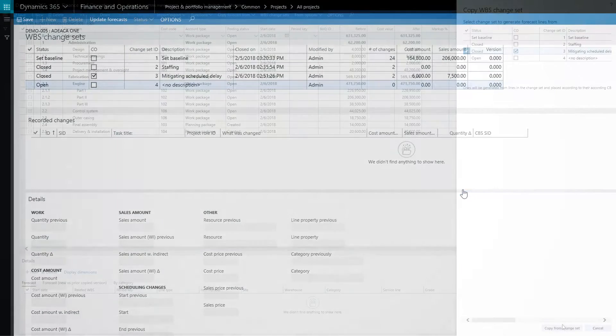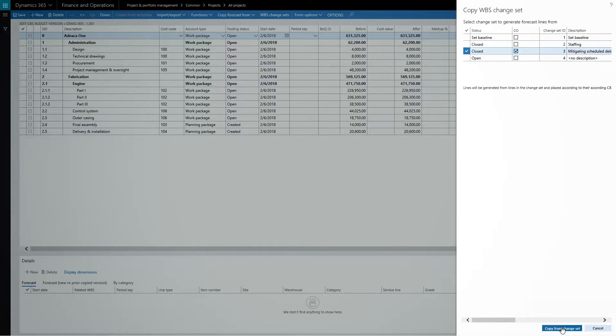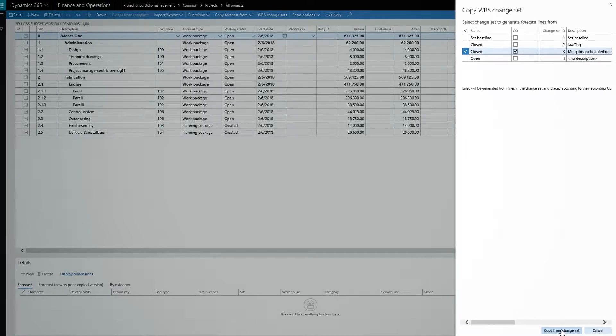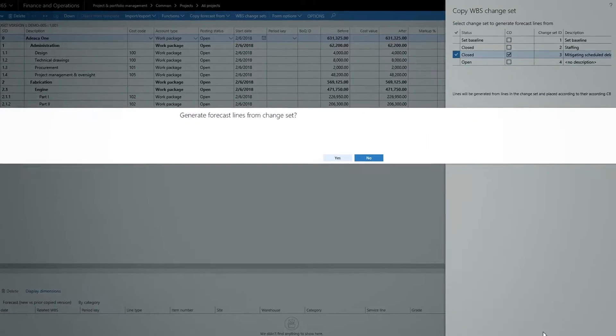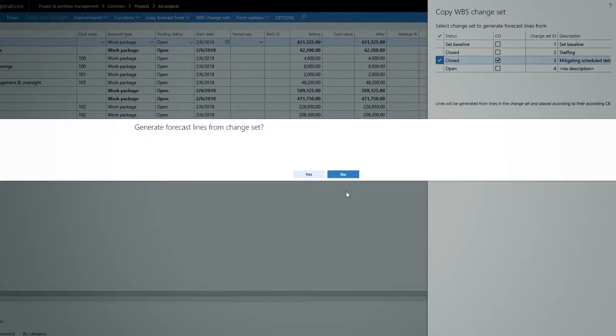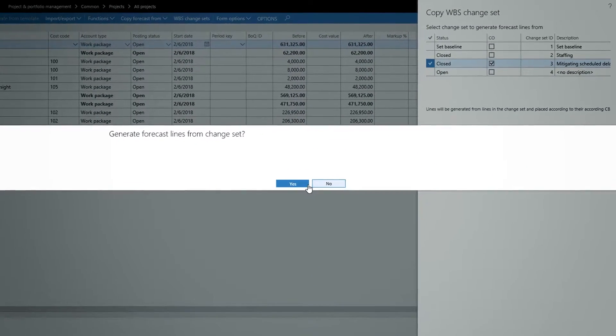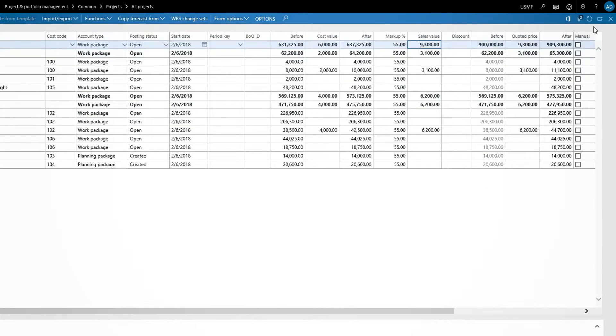Here in a project change order, I can copy one or more change sets and use the estimates contained within as a baseline for the contract variation we're submitting to the client.